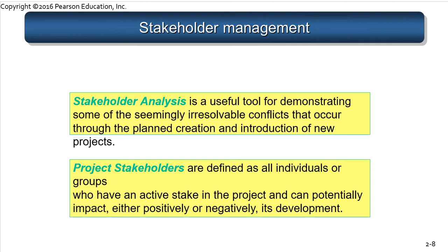All right, in the beginning of a project, and we will see this more clearly when we can go through this in more detail and work out more specific examples, we analyze stakeholders. Typically when you identify stakeholders, you then analyze them to see who is most interested. Remember, a stakeholder is anyone who has an interest in the outcome of the project. You can find out who's most interested and who has more or less power. Very powerful stakeholders who are highly interested in your project are those you really need to pay attention to, and you may need to address in your communications plan.